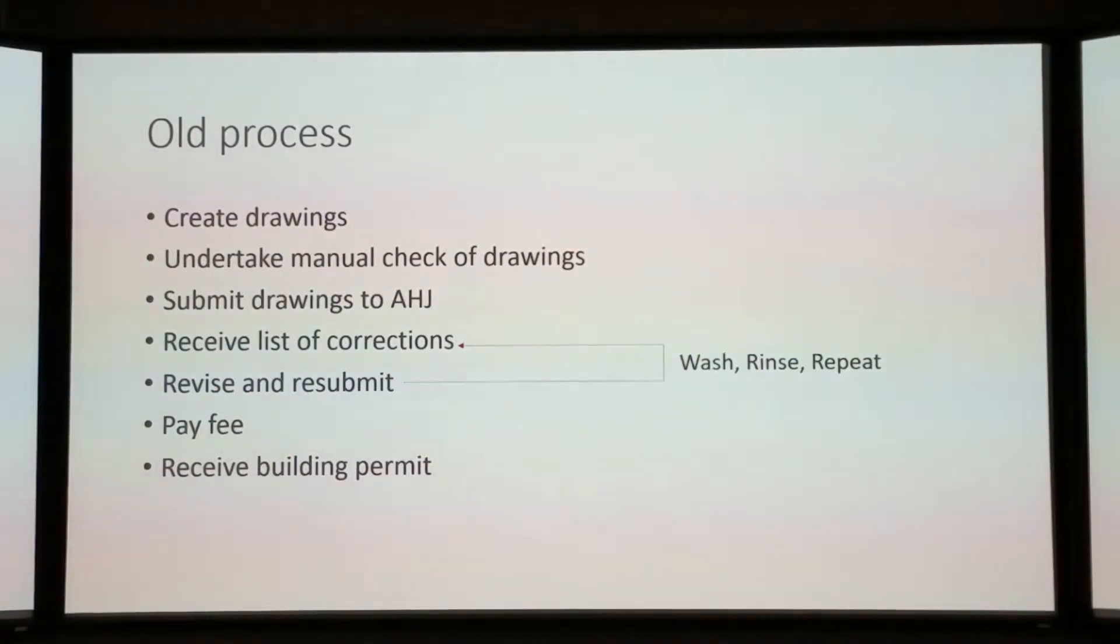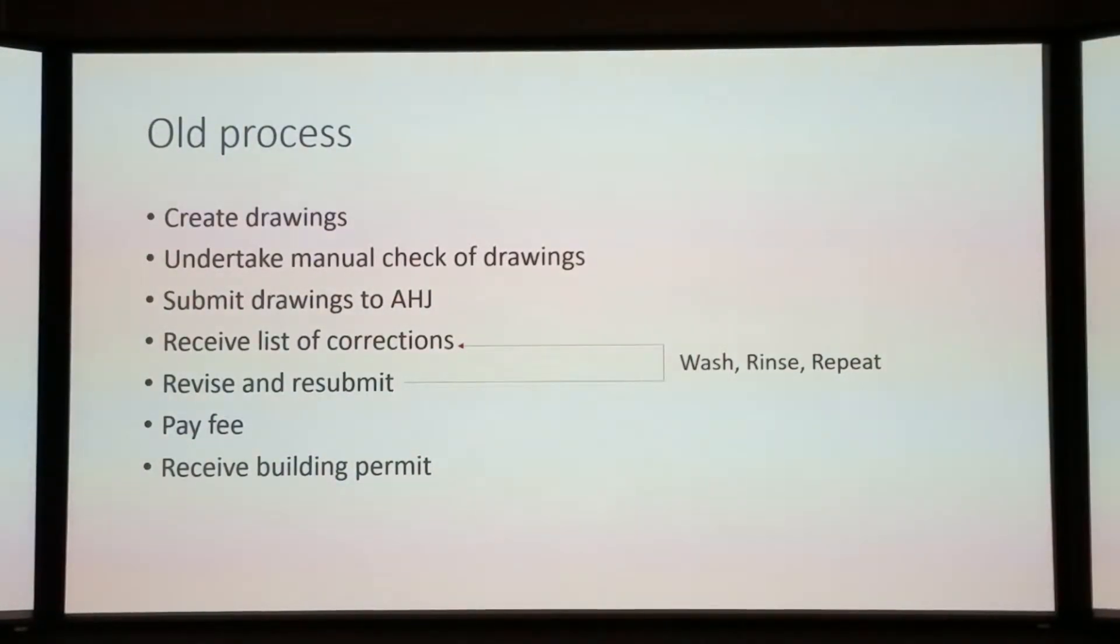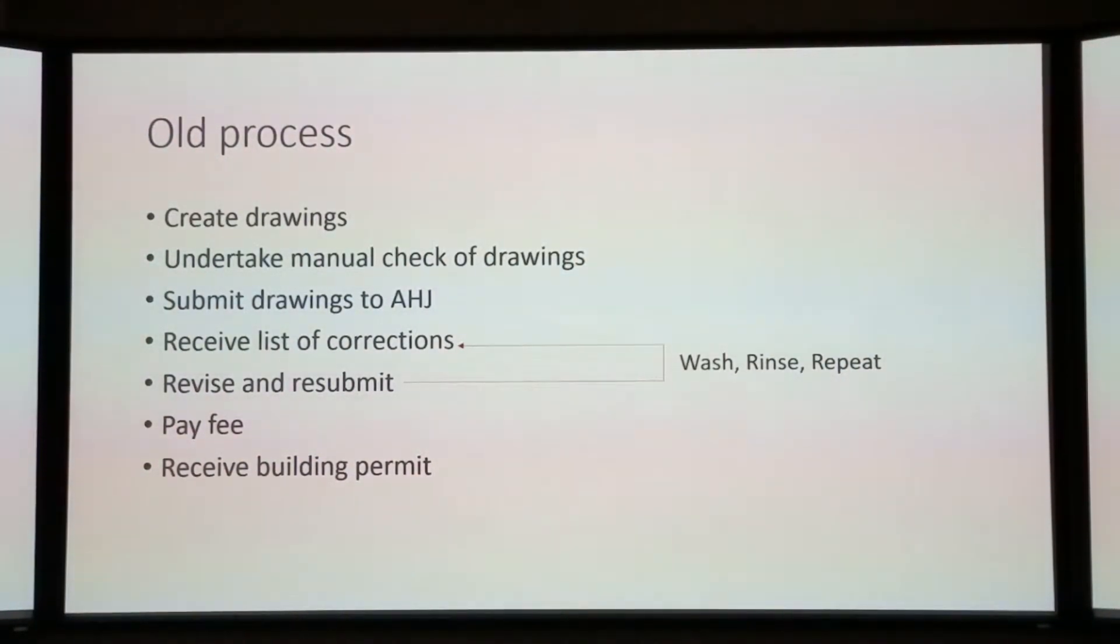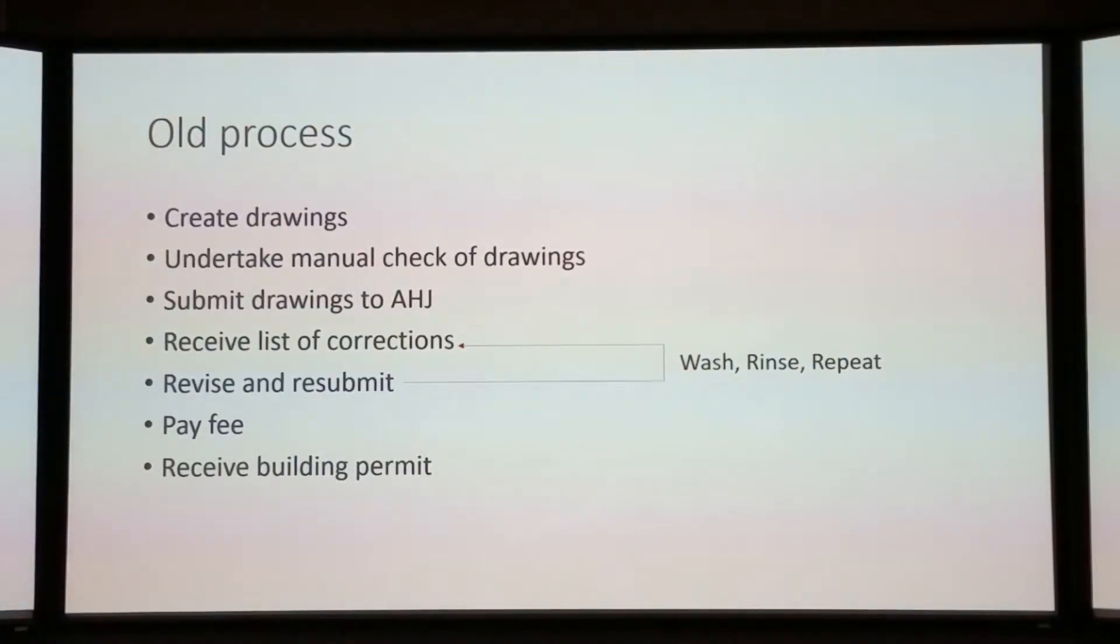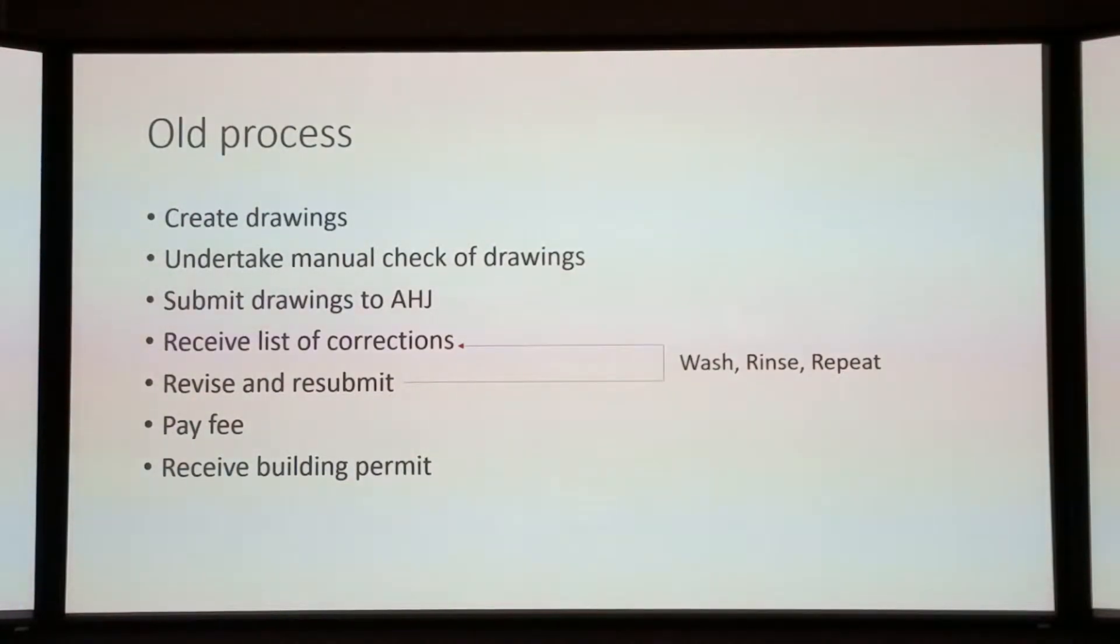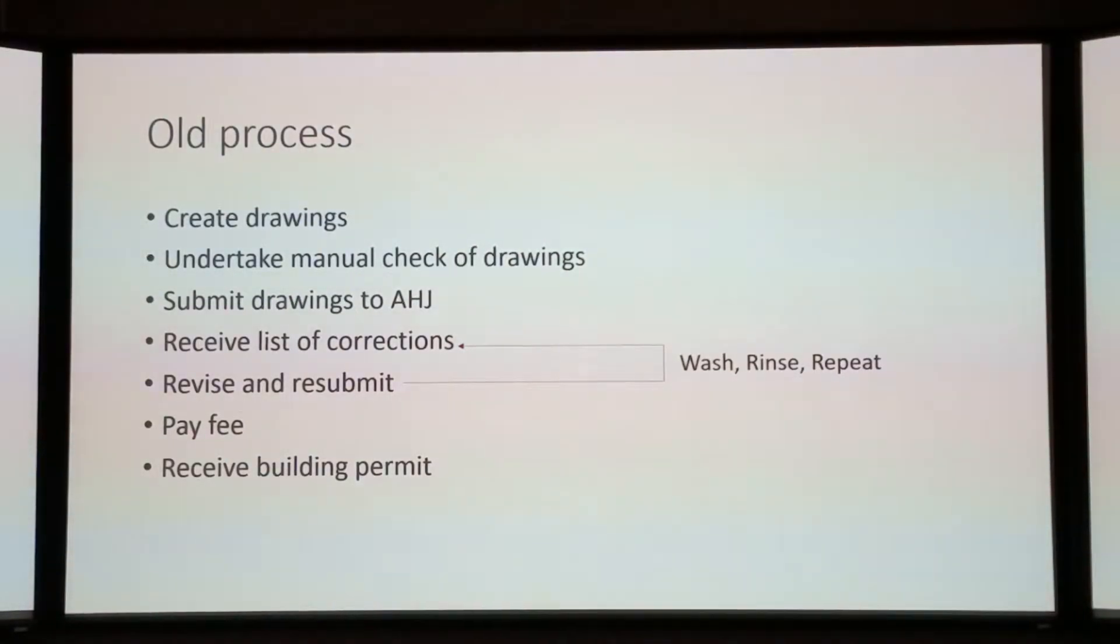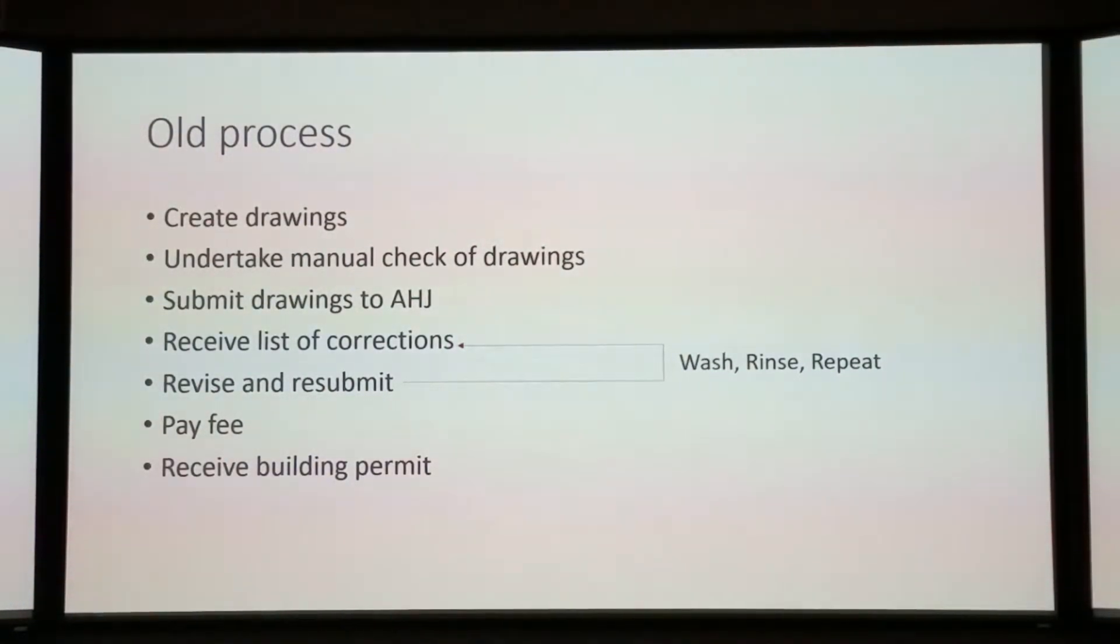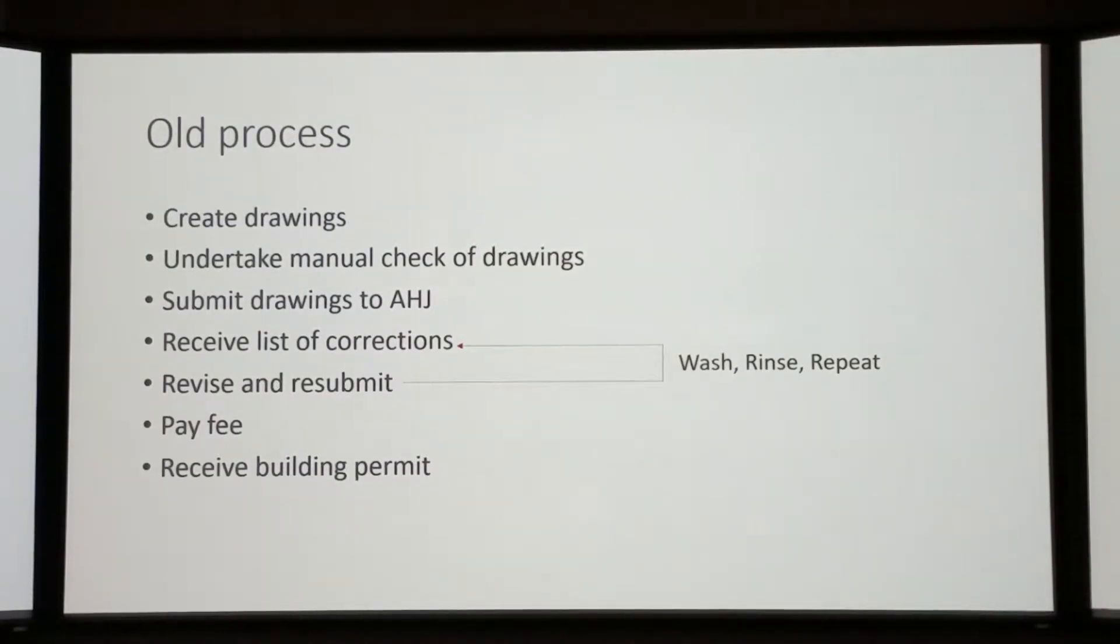Let's compare that to what we do now. We create drawings. We undertake a manual check of the drawings. We submit the drawings to the AHJ. You wait six weeks, if you're lucky. Then you receive a list of corrections, you revise and resubmit, and you wash and rinse and repeat until you've satisfied all of the code issues. In a small municipality like Bryan College Station, that could be two weeks in the city of Bryan, or 12 weeks or more in College Station.